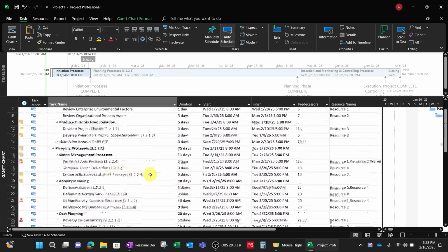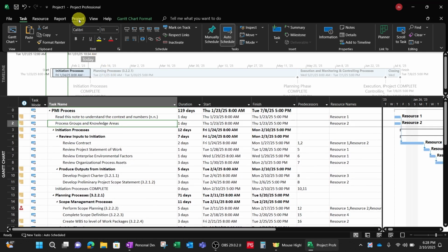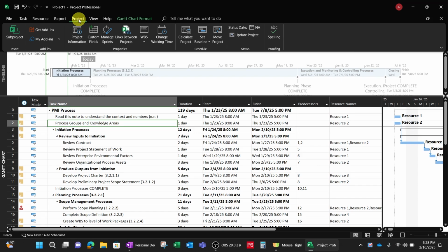This is our plan. So to snap the baseline, we need to go to the Project tab, and then over on the right it says Set Baseline right here. There's a good detail of what that means. You can read under that. It's just taking a snapshot, like I mentioned before, of the information on your project, the resources you assign, the logic on the tasks, and also you can do this multiple times.